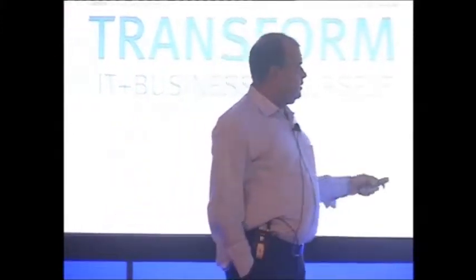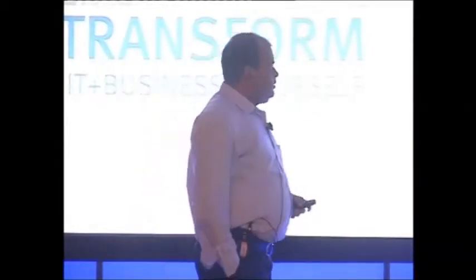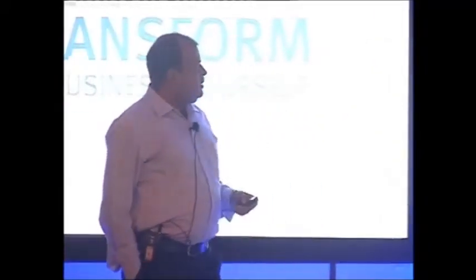So, those copies go to the suppliers, and the suppliers come back with their technical offers, the unpriced commercial offers, as well as the commercial price offers. The technical offer goes to the DEC because they take care of the technical part. The commercial part goes to the Reliance procurement team members. And of course, there is a copy to Reliance for everything that is happening between the supplier and the DEC. Now, that's not the end.